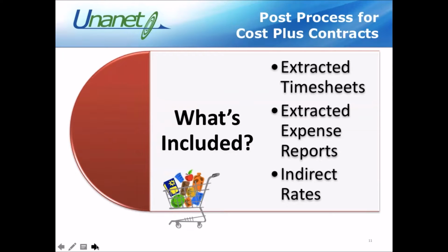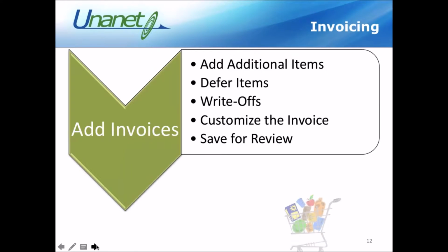So it's important to set the billing type based on your contract that you've negotiated at the project level, so that the system knows when you post the information and you add it to the invoice, it knows how to calculate based on the billing type.